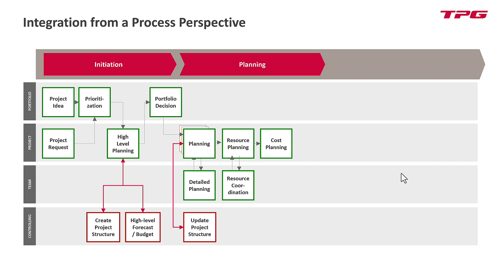Finally, this leads to cost planning. Resources are not free, so secondary cost comes into play, driven by rates, but also primary cost for anything that needs to be purchased for the project. This is essential information for controllers and ERP systems that want to know the current forecast. This helps define a top-down budget for the project. A detailed cost planning leads to a high-level budget that is saved into a baseline and compared against.